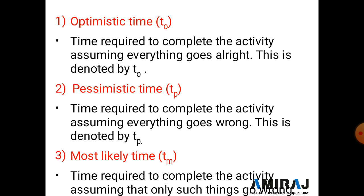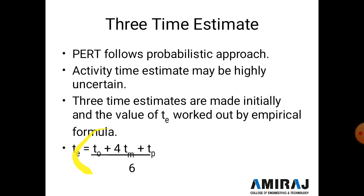All three values — to, tm, and tp — are written into the formula and you get the estimated time te. The formula is: te = (to + 4tm + tp) / 6. With this, we complete today's topic and in the next lecture we will discuss CPM examples.